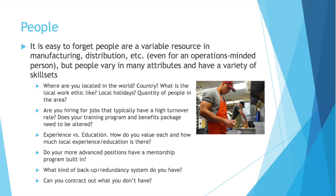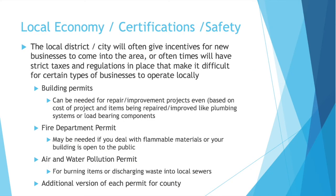Can you contract out positions you don't have easily? What kind of premium is involved with that? It's important to consider the local economy, any certifications you might need, and of course never forget safety. Your local district or city will often give incentives for new businesses to come into the area, or oftentimes will have strict taxes and regulations that make it difficult for certain types of businesses to operate locally. Scoping these things out beforehand can give your business a serious advantage. For example, building permits are often needed for repair or improvement projects based on the cost and items being repaired or improved, like plumbing systems or load-bearing components. Even homeowners sometimes have to get building permits. Did you know sometimes you need a fire department permit? It might be needed if you deal with flammable material.